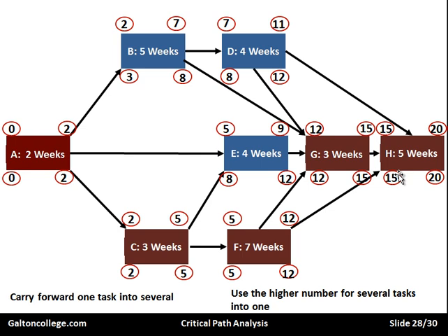Right, so we've now got 15 here. So we carry that 15 across to here. There's one going in there. And there's a 15 here that's going in that direction. We're not taking it. We'll notice here it's a 12 here. We're not taking that 15 because 15 minus 3 is 12. We always take the smallest number, so we're going to take the 12 here, not the 15. So we're taking that 12, take away the 4, which gives us 8.